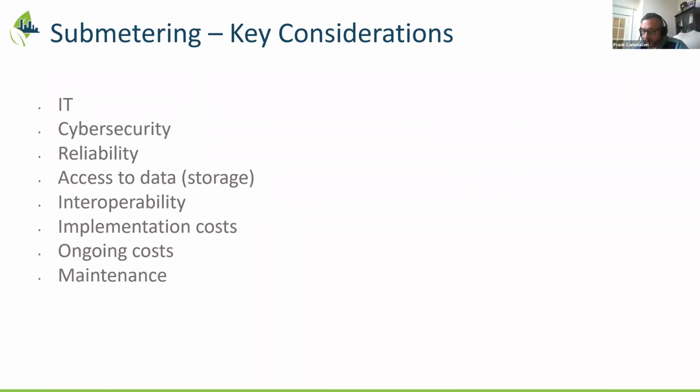Okay, that's very helpful. Yes, I would concur with you that, with the slightly additional cost of going from something temporary to permanent, it's been our experience that things just go awry right afterwards. So I think the economics could be shown fairly easily to justify that permanent installation. It might be a 25 or 30% adder to go with a permanent solution as opposed to one that's there for a month. So I would recommend a permanent one.